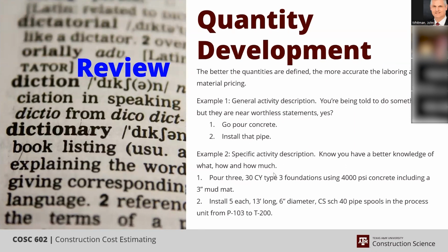To recap on the discussion of having some detail in request, and really what this transposes to is the description that you're including in your MTOs. So not only is it important for whoever's requesting and describing the scope of work and the request, which is partly what this slide is focused on. But when you transfer that information into your MTO, it's always helpful to put as much descriptive information in your activity label within the estimate as you can.